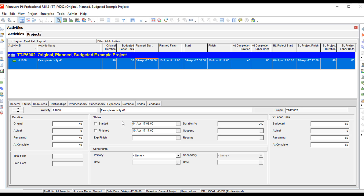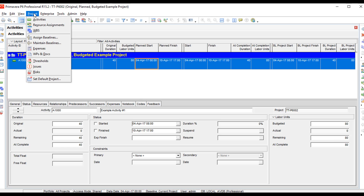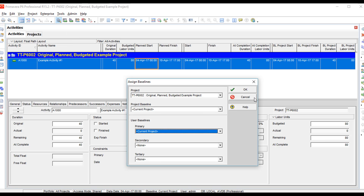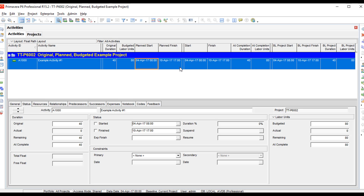Regarding the third set of fields, which come from the baseline — currently I do not have a baseline created. If I go to Project > Assign Baselines, it says current project. P6 is looking at the current project, and by default is actually looking at the first set of fields. If I change the original duration to 50, the at completion duration changed and the baseline project duration changed. So the baseline right now is not static — when we create baselines, those activities, durations, and labor units stay as they are. Right now they're moving because P6 is looking at the first set of fields to populate the baseline fields.